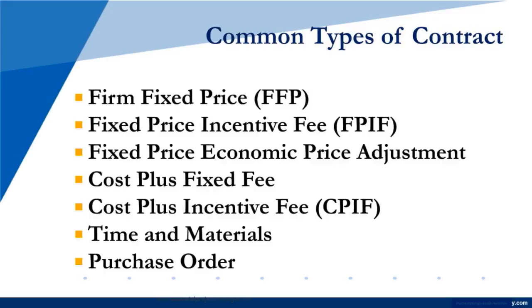Purchase orders are for items that have a standard price to them, pretty much. They're maybe commodity items, and you just get it through a purchase order. There may be agreed upon amounts for things. Think about office supplies, building supplies, things like that are typically done that way. Sometimes equipment can be done with a purchase order as well. It's just a contractual setup that is not executed one time, but is agreed upon for a specific period of time, that I can buy goods and services basically by sending you an order for them, you send them back, I send you a check. It's kind of straightforward.